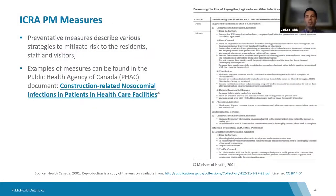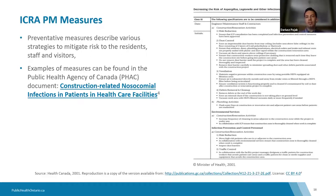To identify the specific requirements generated by the ICRA table, one resource is from the Public Health Agency of Canada, which specifically addresses construction in healthcare facilities and provides a list of specific measures. For example, PM measure three covers dust control, ventilation requirements, debris removal and cleanup, and traffic — all outlined with specific requirements. When PM measure three is required, both PM measures one and two are also required as a combination of resources.